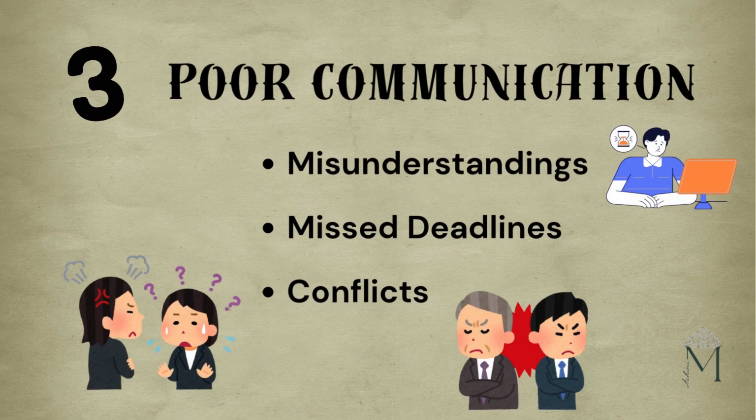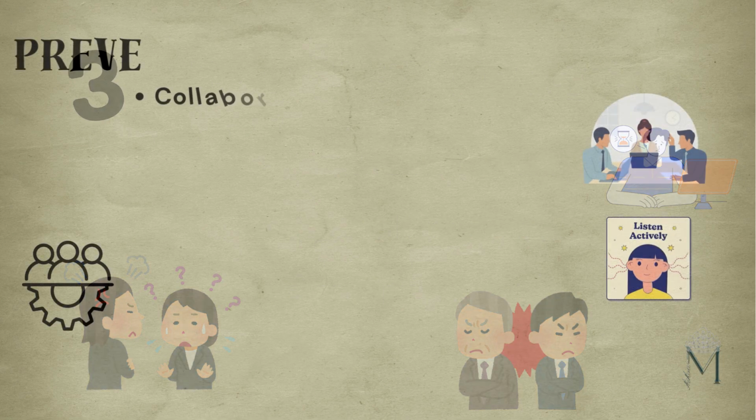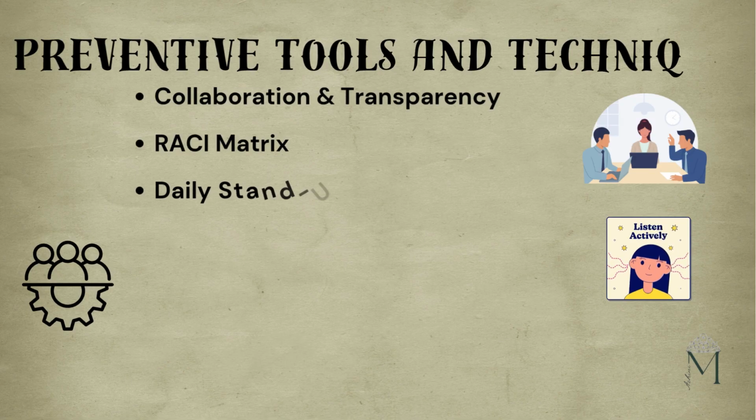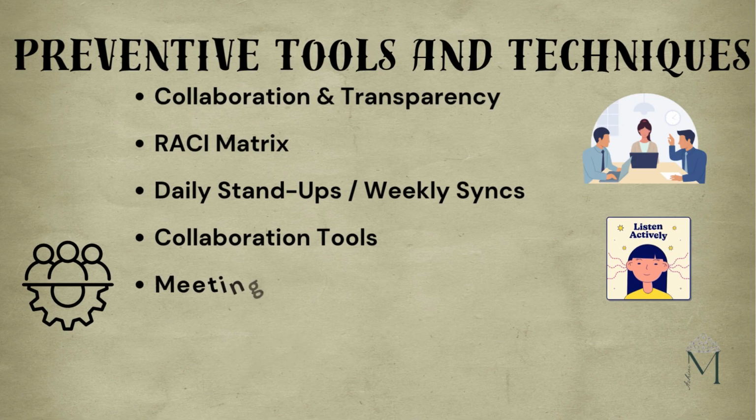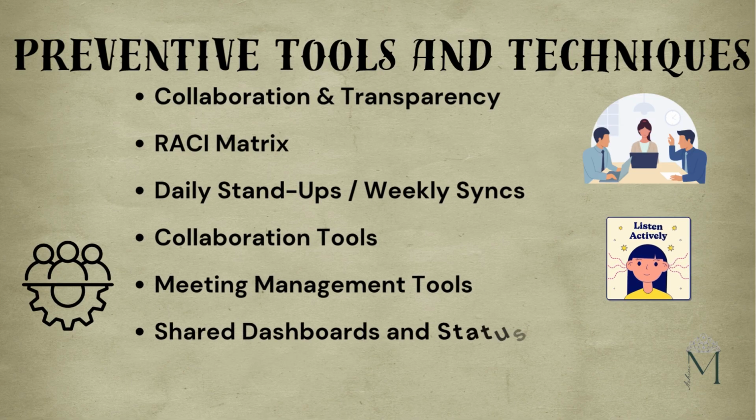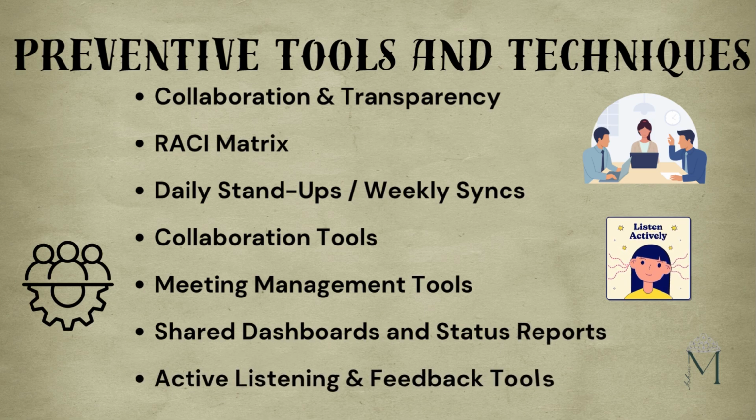Communication issues are silent killers of projects. A simple misunderstanding can lead to days of rework. In remote settings, especially, it's important to set clear expectations and have regular check ins. In order to prevent poor communication, start with a communication plan. It defines who needs what information, when, and how they'll receive it. You can use tools like Microsoft Word, Excel templates, or project management software to build this. Having a proper communication plan will set expectations clearly from day one.